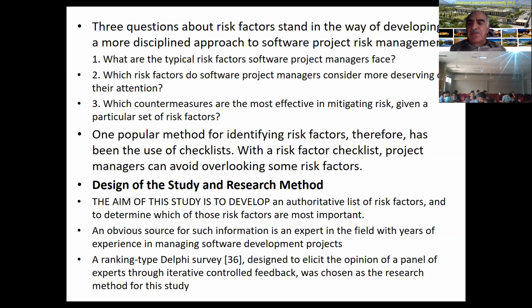We use this in the projects also, in construction projects, when we are going to, for example, allow the concreting in the site. We have the checklist method: we go to the site and try to see what can be the risk involved in the concreting. So we check the 12 or 10 important parameters of the concreting, and then based on that we allow the concreting.